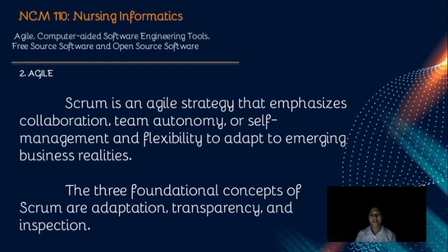The second one is inspection. The Scrum artifacts and the progress towards agreed goals must be inspected frequently and diligently to detect potential undesirable variances or problems. Inspection is done by everyone involved in the project, though it should be supported by the Scrum Master. So, collaborating with the team in all aspects of the process, together they diagnose any unplanned deviation from the sprint plan and create opportunities to review them.